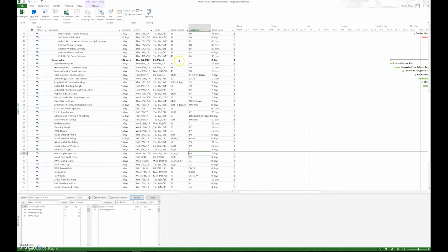make sense. So to revisit what I just said, every activity has to have a predecessor and a successor except for the first and the last. The first activity should not have a predecessor. The last activity should not have a successor. If it does, you have an open network. If you have an open network, your total float is junk. That number does not mean anything. So only through a closed network can you get that accurate information.